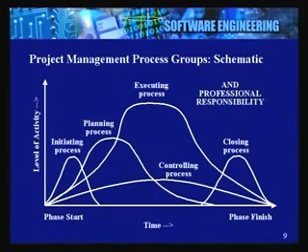So getting a sign off from the client, settling all the bills, filing and handing over all the project papers to the librarian, making sure that all the end of phase reports are completed, the learning experience from the projects is well documented, and the process improvements that may arise out of the project's activity, all those activities have been initiated.